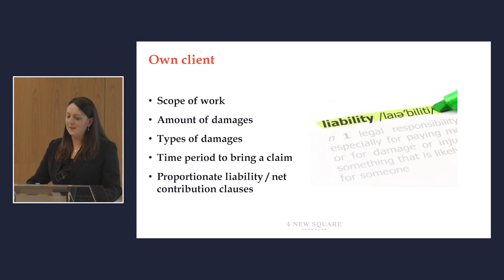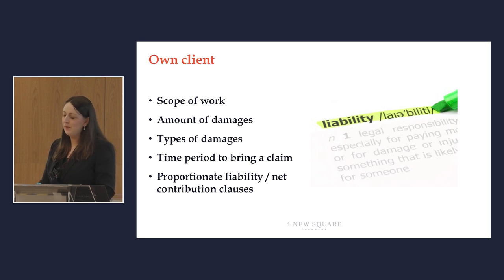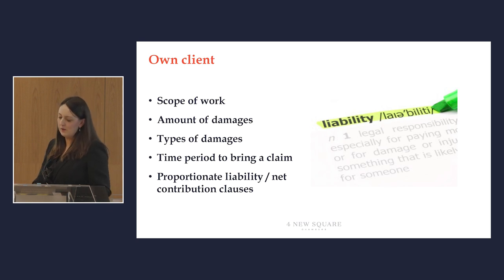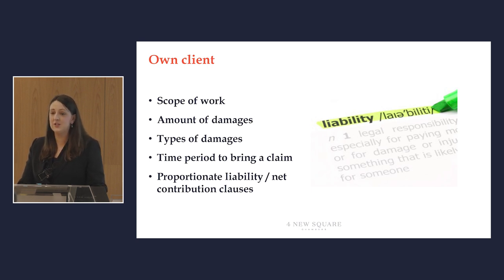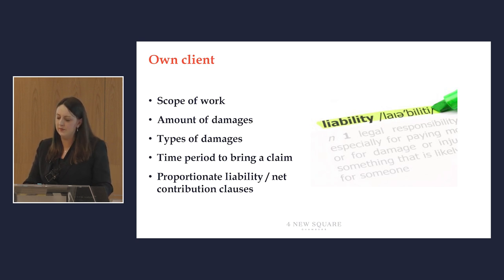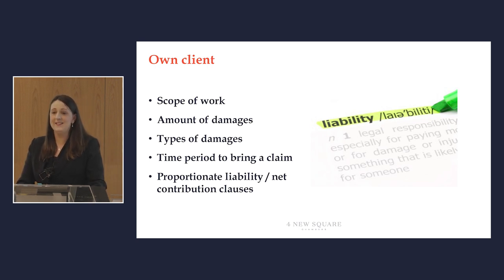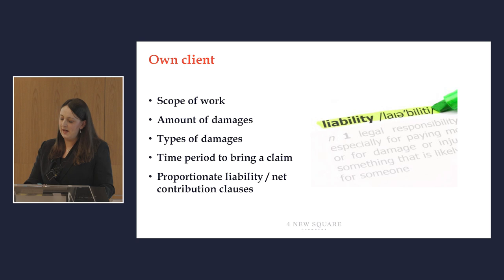Limitation of liability clauses come in a variety of different shapes and sizes, beginning with those applicable to the professional's own client. First and foremost there are scope of work clauses, which exclude a specific duty to do something which might otherwise be accepted. For example, an architect's terms may set out a duty to carry out periodic inspection of building works but expressly state that the architect is under no duty to supervise the execution of the works. On one view the effect of such clauses is simply to define what the professional undertakes to do rather than to exclude or limit liability.